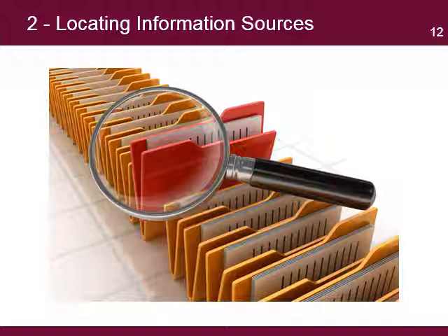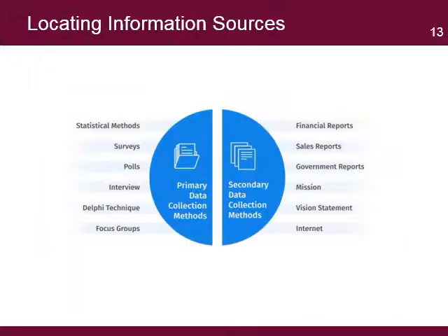Locating information requires a strategy that will facilitate identification of information sources that are valid and reliable. Information derived from original sources is more reliable than secondary information. Secondary information is usually prone to errors, bias, or simplifications compared to the original information. This is caused by the handling that occurs when moving information from one source to another. The more a piece of information is handled, the less reliable it becomes.